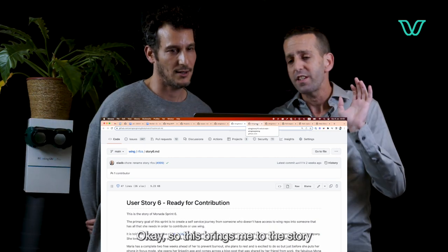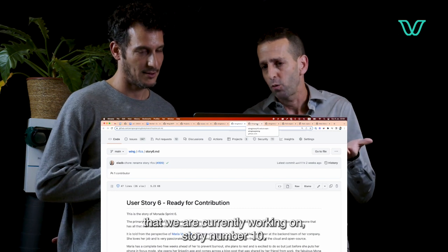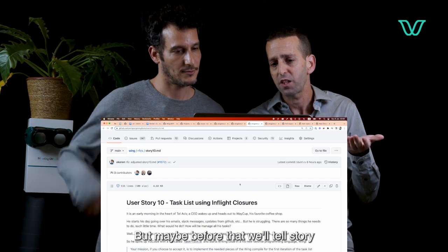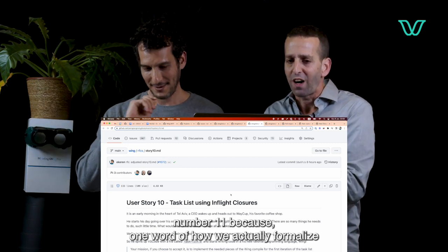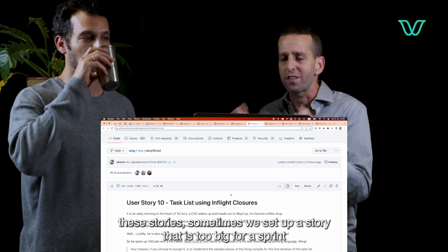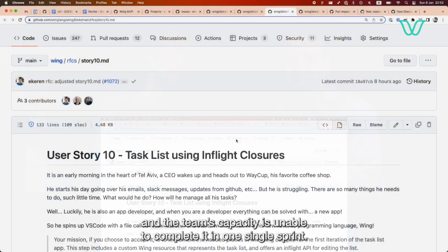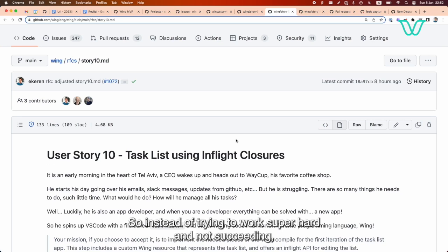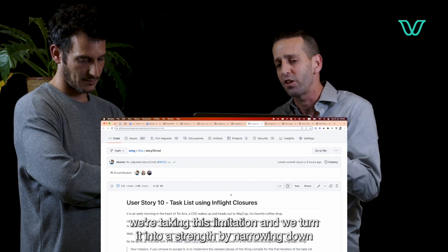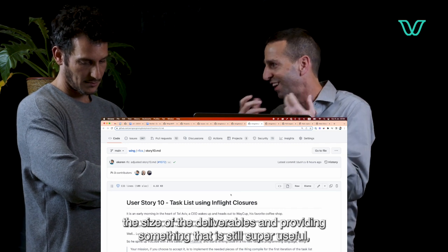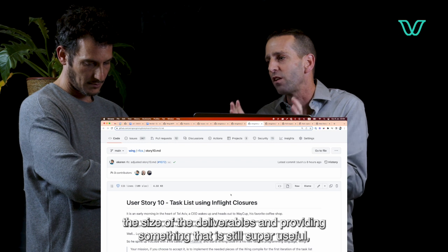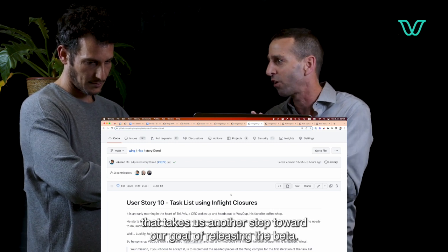Okay, so this brings me to the story that we are currently working on, story number 10. But maybe before that, we'll tell story number 11, because one word on how we actually formalize these stories. Sometimes we set up a story that is too big for a sprint and the team's capacity is unable to complete it in one single sprint. So instead of trying to work super hard and not succeeding, we take this limitation and turn it into a strength by narrowing down the size of the deliverable and providing something that is still super useful and takes us another step towards our goal of releasing the beta.